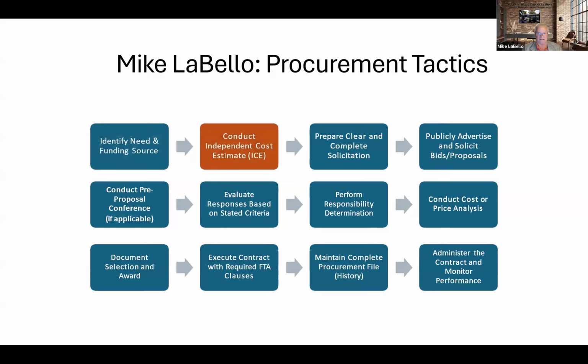The next task, conduct an independent cost estimate. Here you're looking to estimate the cost before reaching out to vendors. This kind of determines a ballpark price and sets expectations for the funding.